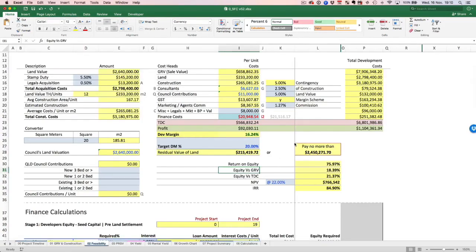And the reason is that you need that kind of margin, because you hit a snag somewhere, like in my Brisbane project, I hit a snag somewhere with the stormwater. It cost me $42,000 to get it fixed. It came out of my pocket. So I need to make sure that if I hit something like that, like an unforeseen expense, I can weather it. So what I was trying to get across to you was, don't limit yourself with the size of projects that you'll be looking at.